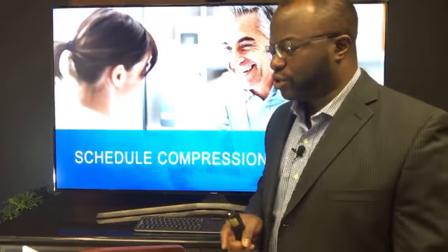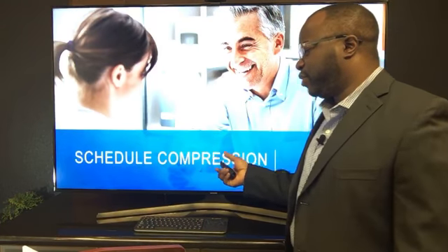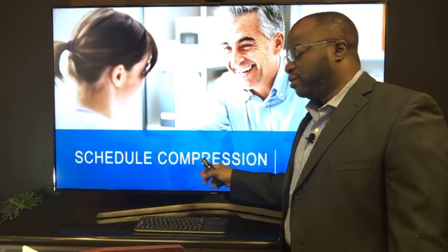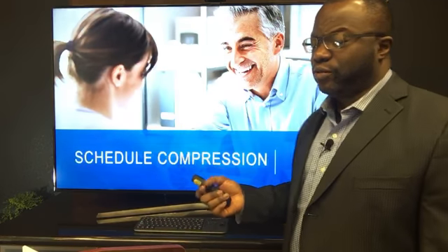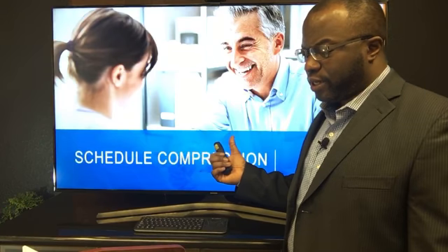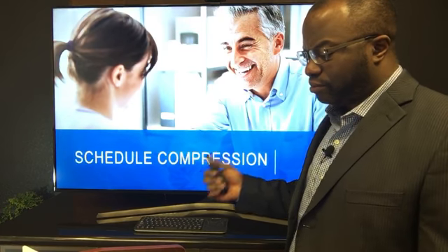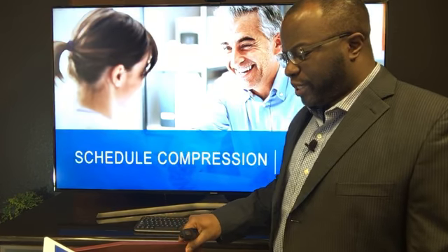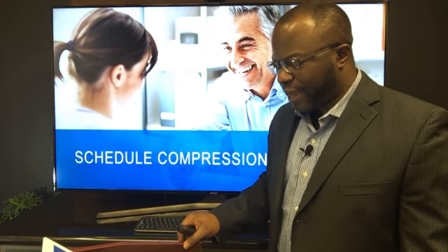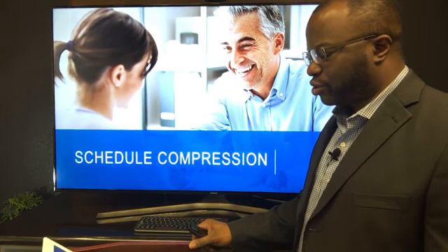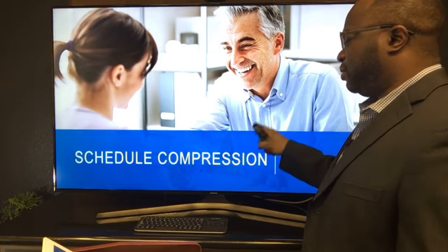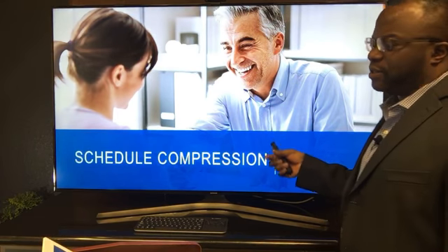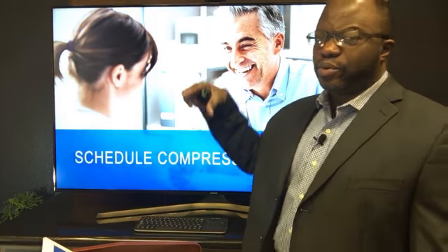You decide to add resources. That is controlling. So the subtleties between using schedule compression for planning versus using schedule compression for controlling will be obvious from the question. All right? So look out for it. Bruce says, develop usually equals planning, controlling equals monitoring and controlling. Absolutely. So just look out for where they are steering you towards, or as Heather said, where they put you.